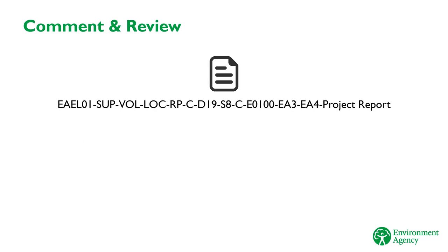The author code on a document indicates which organisation is responsible for the document. If we make any changes to the document, for example, by suggesting changes during the review process, then the EA is responsible for the changed version. There are two ways to deal with this.